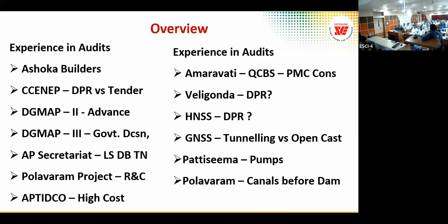We completed that project at the initial DPR cost, increased by that initial 50%. I have both the DPRs, with the market rate and with the DSR without market variation index. And we completed the project at the tendered cost without any claims or escalation. We put the contract period at 30 months. There was an escalation clause and the project was handed over in 30 months.